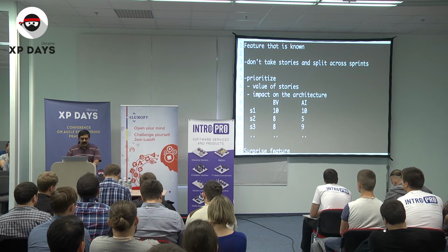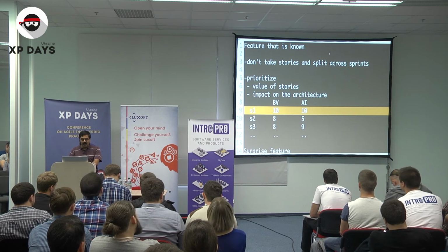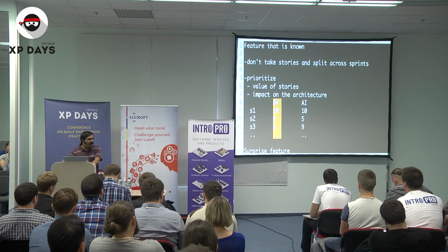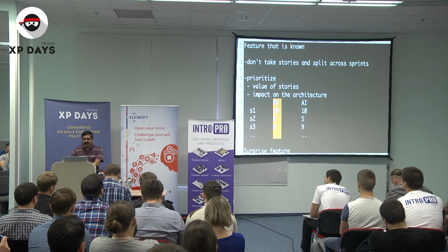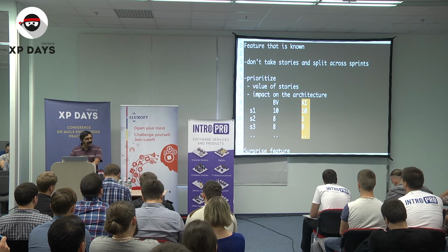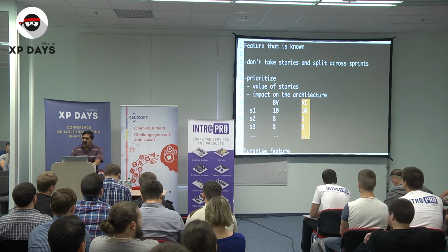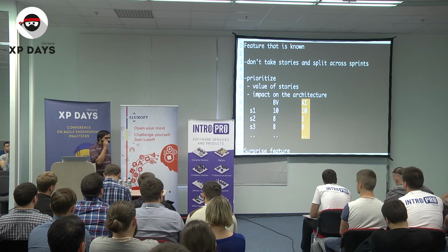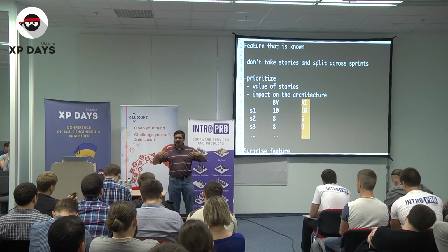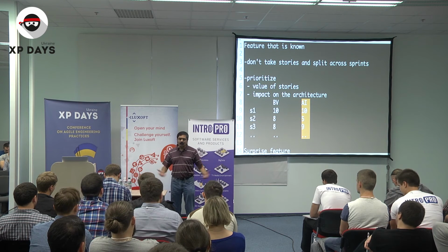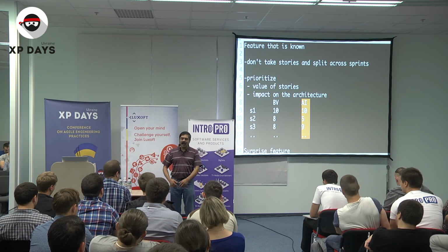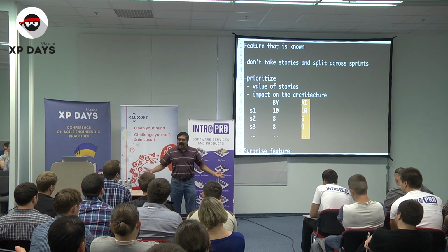In the planning phase, you need to have people who understand the business. But that is not enough. You also need people on the project who also understand the architectural consequences. So a planning has to happen among business people and technical people working together. And we don't do sprint planning properly most of the time. We kind of come to the team and say, hey, we want you to give estimates. Well, that's too late in the game.